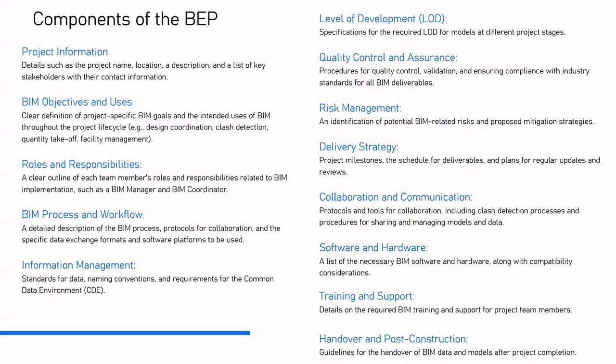And while this might sound relatively simple, what typically tends to happen, though, again, is different entities within a project team have different preferences as far as tools go. And what we find more and more is that different year versions of software, 2023 is no longer compatible with certain features in 2025, or the 2026 software has some glitch. So it's critical that there's a standardization and everybody agrees on the data exchange format and the software platforms that are going to be used.